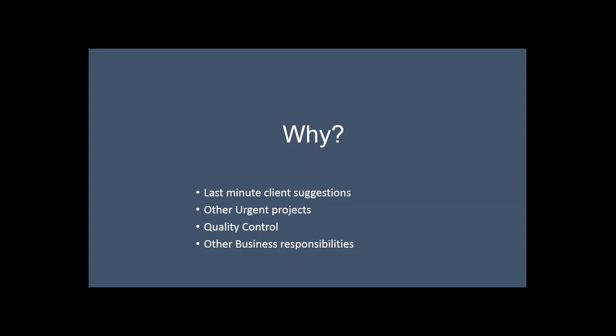So generally what happens is when you go back to them with the first draft, then they start understanding what is going on. And then suddenly they become creative and they start giving you suggestions and it goes on and on and on. So whenever you have new suggestions, add them to your deliverables list and send it to the customer. And you can tell them that, okay, it's going to take more time, and at the same time, it's going to take more cost.